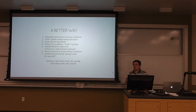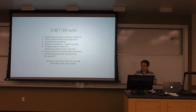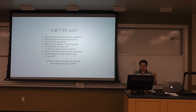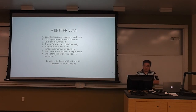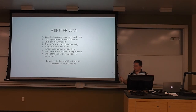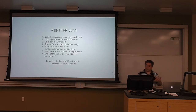They started using a pull system to avoid overproduction — this is where just-in-time production came from. They don't produce part X needed by step Y until step Y says they need more. They keep a small buffer — enough to give time to produce more before you run out — but don't overproduce. Just build what you need, no more, because things change. A big part was also leveling out the workload so that steps were roughly uniform in time.